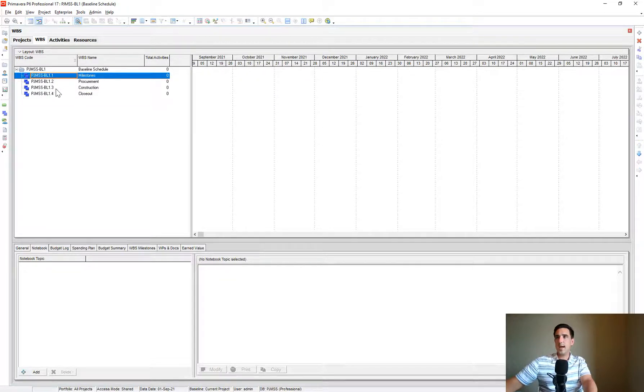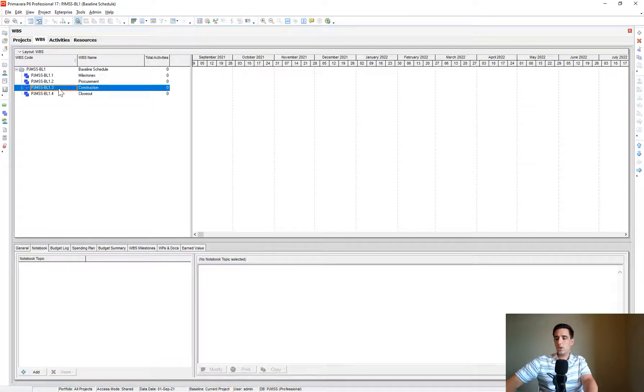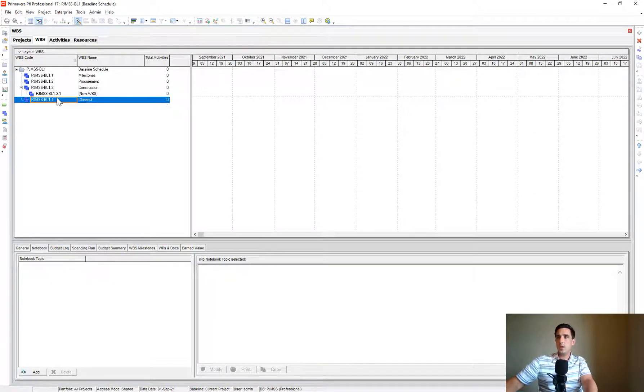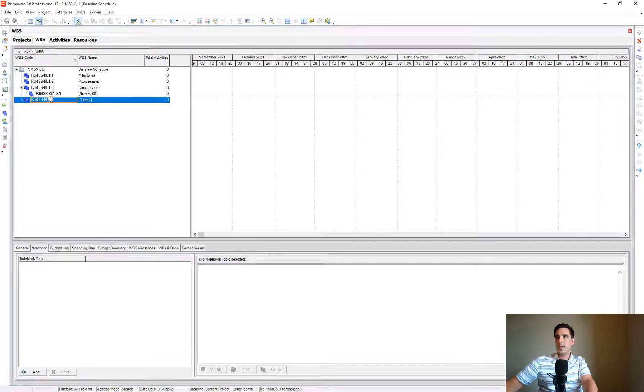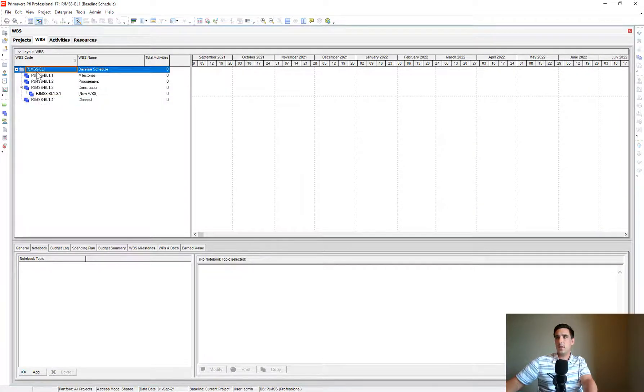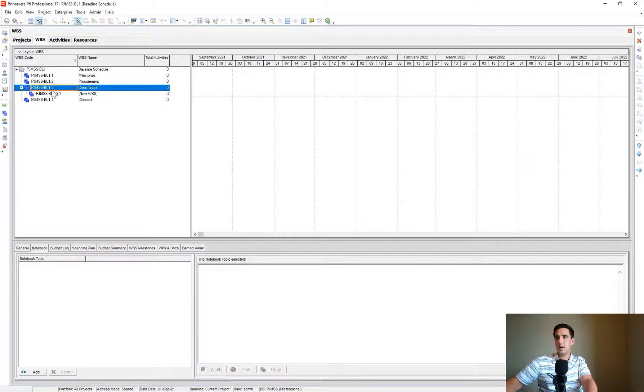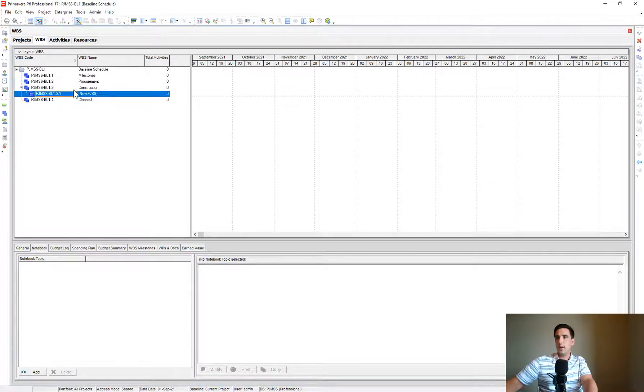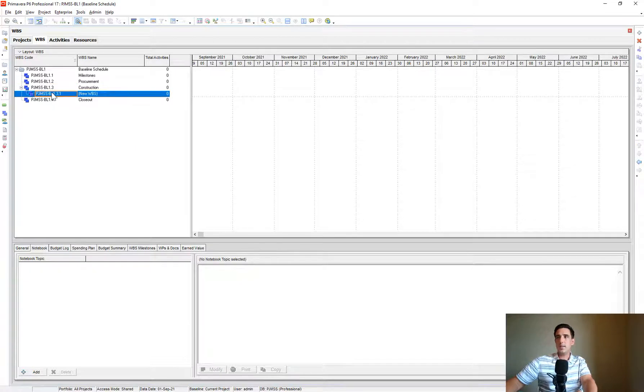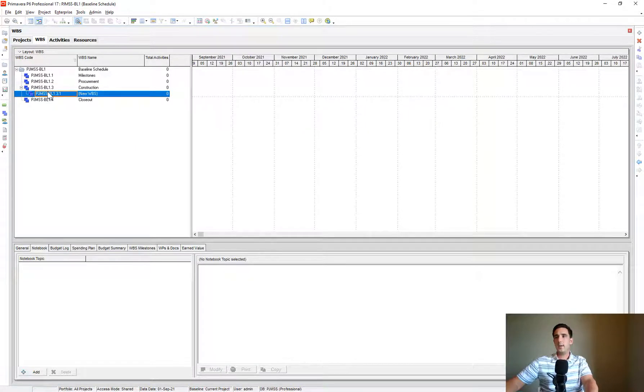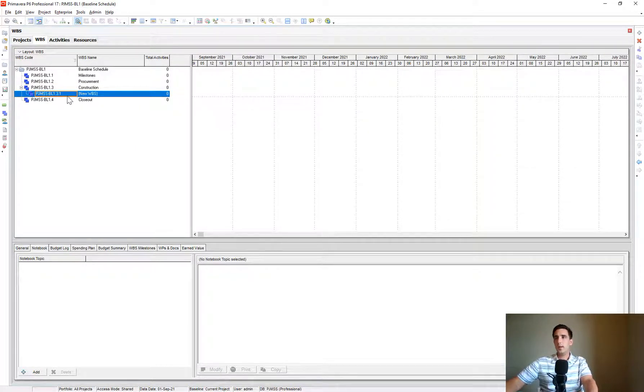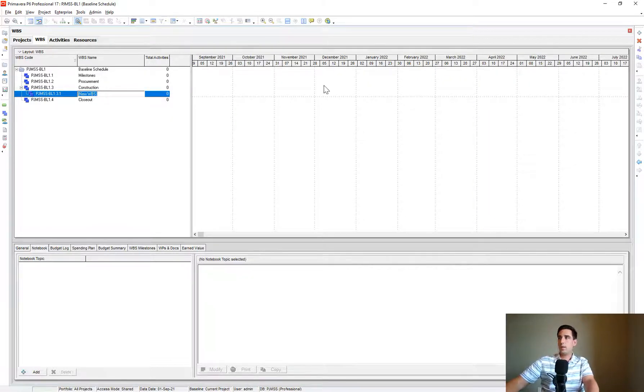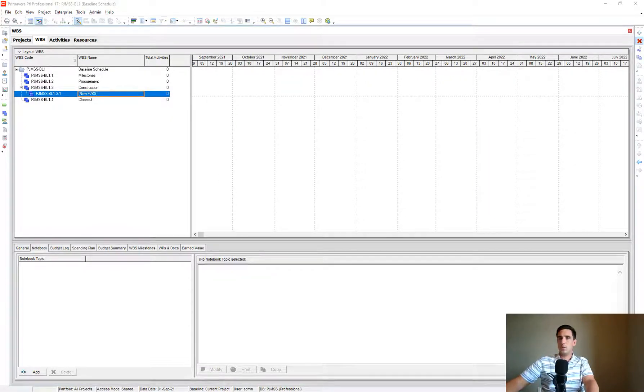I like just the numbers that they automatically assign to the WBS codes. Because then as we start adding children underneath that, you'll notice it'll say it's the project ID dot. So it starts here, see the project ID. So then it's dot three. So that's the third WBS here, dot one. So now we know that's a child to the Construction section. It's just easy to follow that nomenclature that they automatically give to it. Let me delete this just so we're all on the same page here.